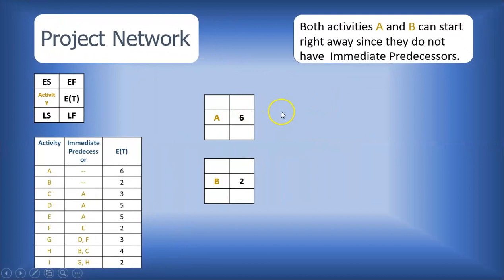So here we go. We are beginning the network. We noted already that since activities A and B do not have immediate predecessors, they can begin right at the start of the project. So here we have them, activities A and B, starting our network diagram.